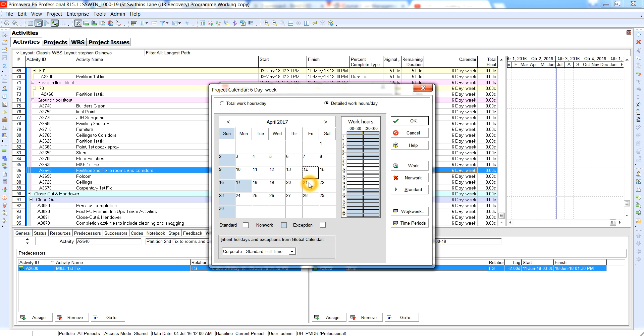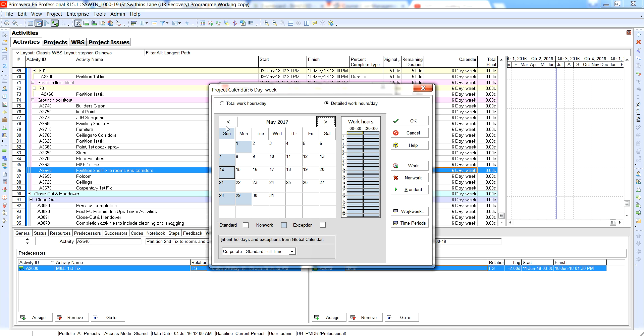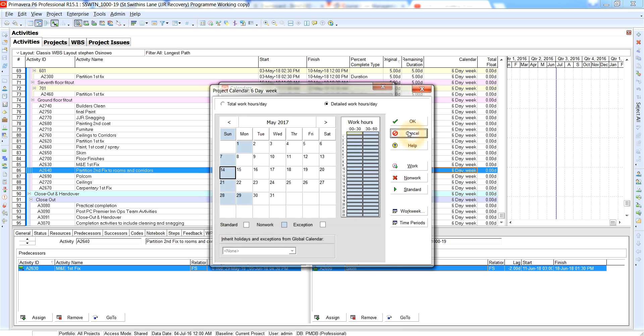As you can see exactly as we said, you have some days where there's no working days there on a Monday, you have working days on a Saturday, on a Friday, two Fridays. So you've got working days between eight and three o'clock, three to four. In essence you can already see that this has basically skewed up your total flow values and this is why you're getting different times in terms of the start and finish times.